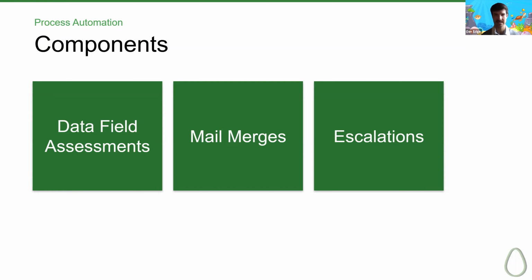And we can even go one step further and add an additional escalation rule to pull in the director as an actor on that process if it hasn't moved in 7 days. This thing hasn't moved in a whole week. Let's pull in the director to push this along, and then they can get what their team needed.